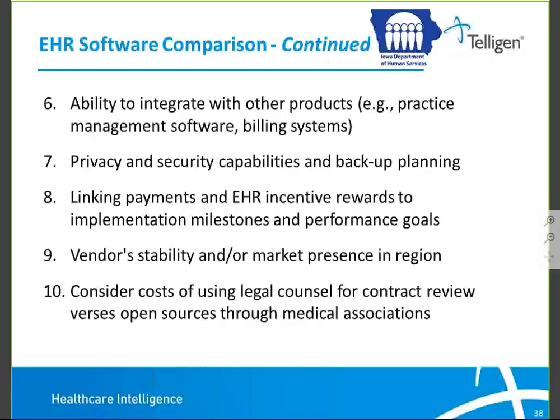Number 8, linking payments and EHR incentive rewards to implementation milestones and performance goals. So in terms of any EHR incentives you're looking at, some folks like to get their vendor also involved in that, in terms of making sure that I can get to my reports that will help me to attest to those incentive programs. Sometimes getting the proper reports and meeting those performance goals can be challenging with certain EHRs, and so talking to your vendor about that in advance is an important thing to do.